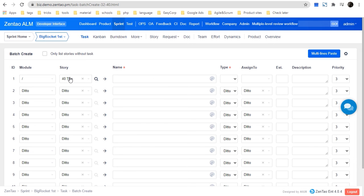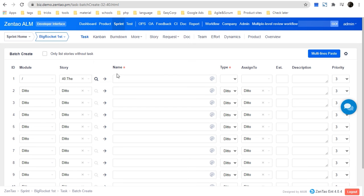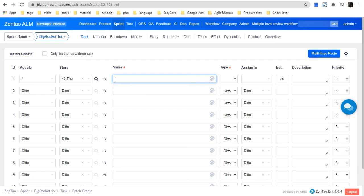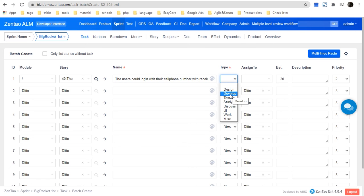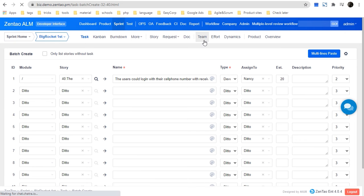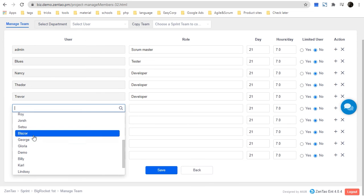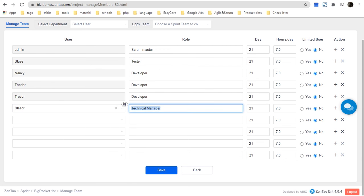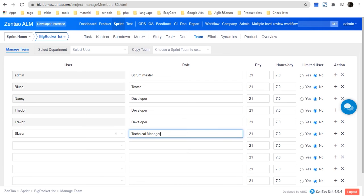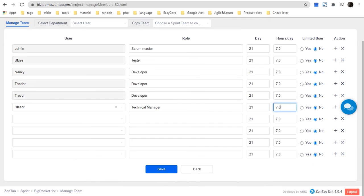In the task creation form, you can choose the story and click 'Copy Story' to get the exact name of the task from the story. Then choose the type, such as a development task, and assign it to a team member. For team members, you need to set them in Sprint Team — choose any user in the system, type in their role, set their working days and working hours per day, then click Save.